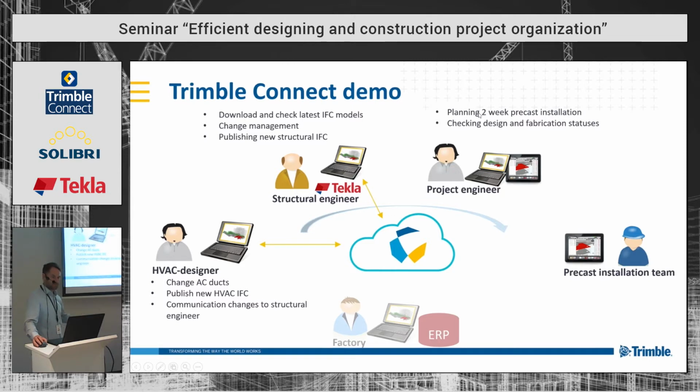And for example, in this case, he's planning the 2-week precast installation plan using, for example, Trimble Connect desktop. And he's checking what is the status, is everything ready for the installation. And then of course communicating if there are some issues, communicating that information back to the structural designer or the factory.